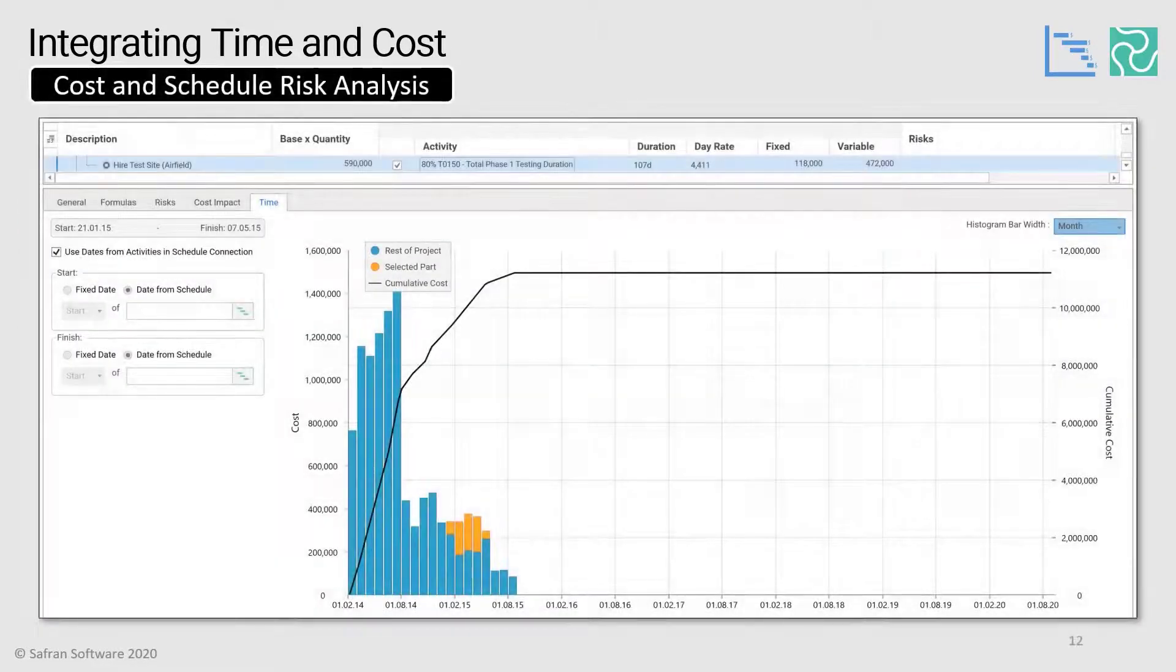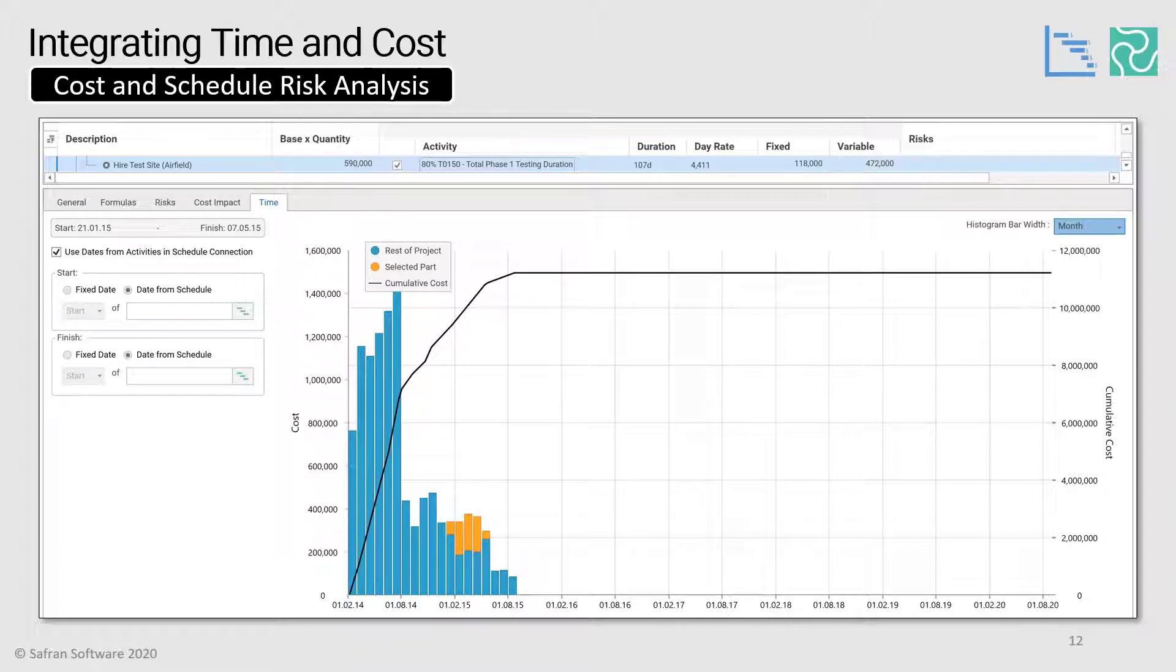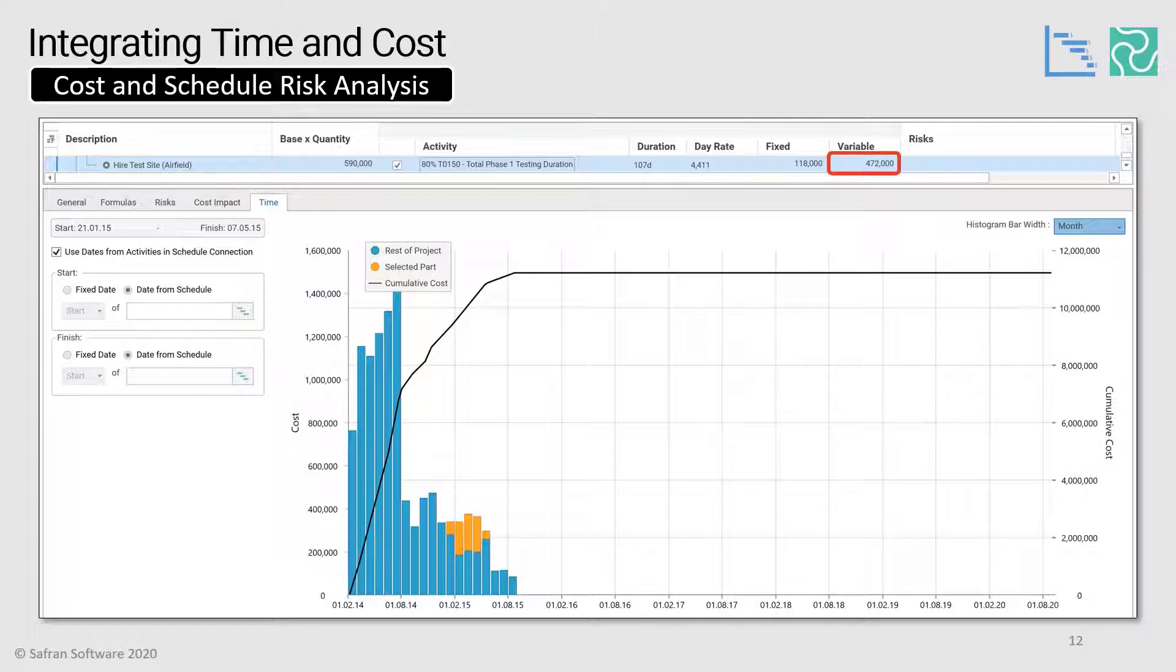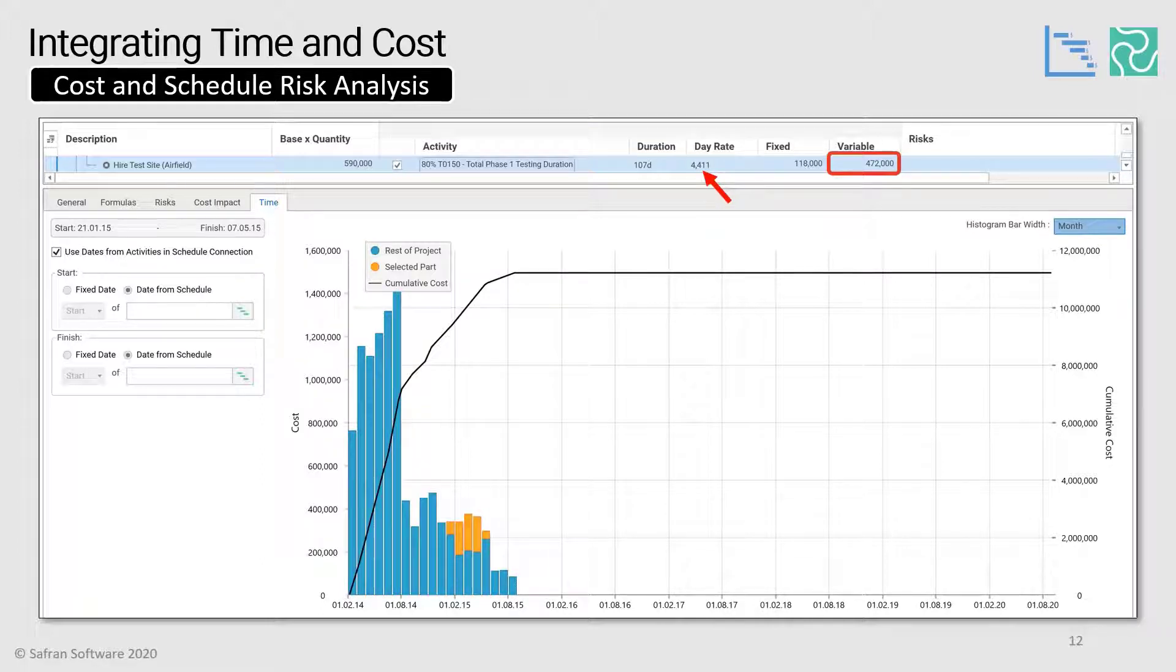You can see here that the hiring of the test site is just a single lump sum base price of 590,000, but what we've then done is linked it to the hammock of the testing phase and then said that 20% of the cost is actually anchored. It's spent. It's not going to change. It's fixed. And the 80% remaining is variable. And it's this variable portion of the cost that translates longer, higher durations due to risk and uncertainties into additional prolongation costs. Or maybe it will even cost less if the time saving opportunities are realized. So what the system is automatically doing for us is taking the variable portion, dividing it by the 107 days and then giving us the day rate, or maybe you call it burn rate, of 4,411 per day.